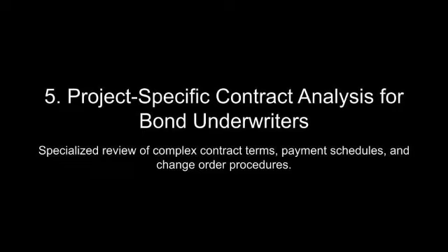Balancing contract compliance with bond obligations. For sureties, liquidated damages clauses introduce a dual challenge: ensuring that contractors comply with their contractual obligations while managing the financial risks associated with claims. When a project encounters delays, the invocation of liquidated damages can escalate bond liability, particularly if the contractor lacks the financial resources to pay the stipulated penalties. This is especially true in contracts with strict or punitive liquidated damages provisions, where the cumulative damages can quickly exceed the contractor's ability to pay.